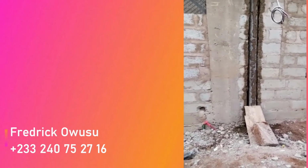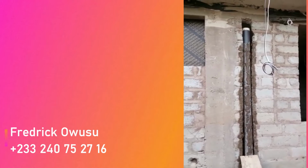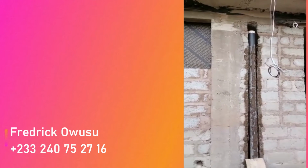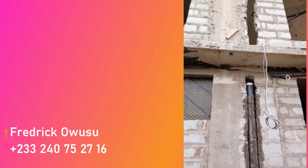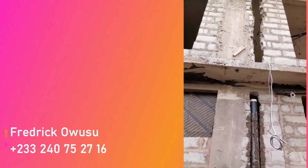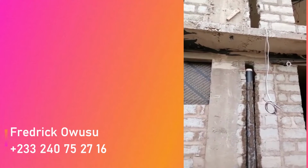When it comes to supply lines, make sure they are tested. Mr. Fredrick Owusu has a device with which he tests all piping systems to make sure there are no leakages before plastering begins, and then they do the tiling. And if you have already undergone your plastering, he will still do a test for you before tiling commences. You understand? That is very interesting.